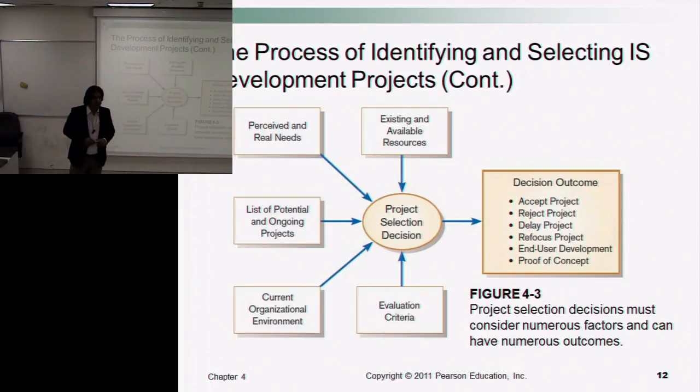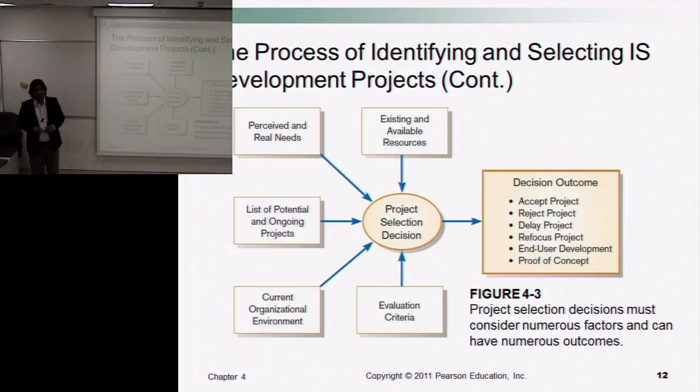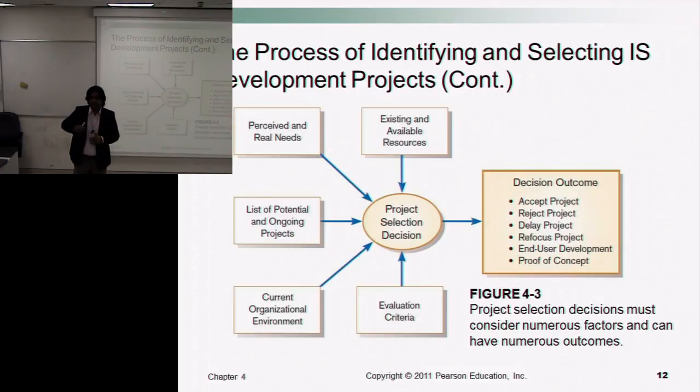Ranking and classification. Classification and ranking. Now, this ranking is based on certain criteria. What are those criteria? Risk, okay, and project size, duration, yes, and meeting your goals, okay, maybe cost. I can say, since this project has the highest possible cost involved, let's rank it as lowest.